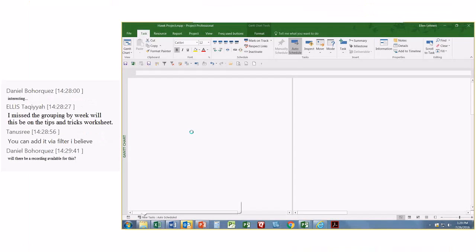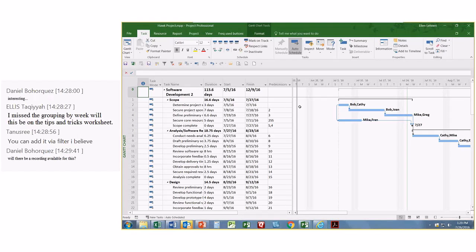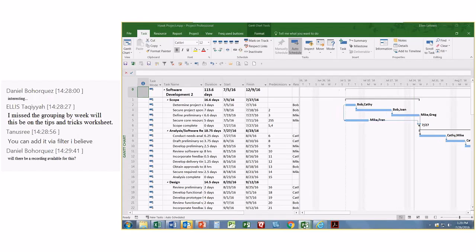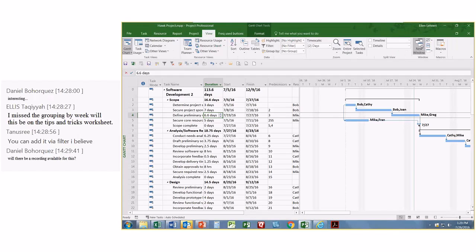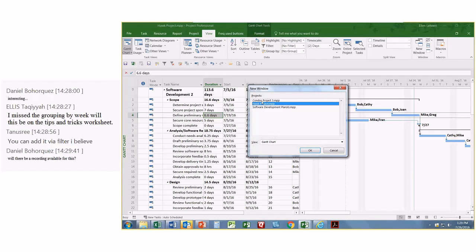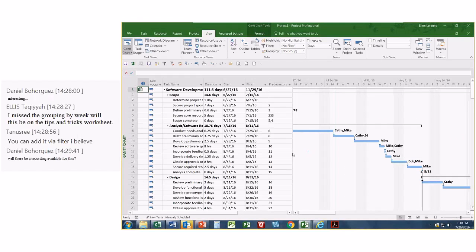Right now I really have 3 different files open, you can see this. But I want to combine Condor and Hawk. So what you do is you go to View, New Window. All I do is click on Condor, hold down Shift and click on Hawk, and say OK. And it's going to create a new file for me.